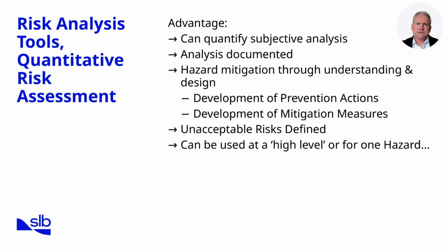Third, quantitative assessment improves hazard mitigation. By clearly defining risks, we can design targeted prevention actions that reduce probability and mitigation measures that limit severity. This structured process avoids wasting resources on ineffective or unnecessary controls. Another key benefit is the ability to define unacceptable risks.